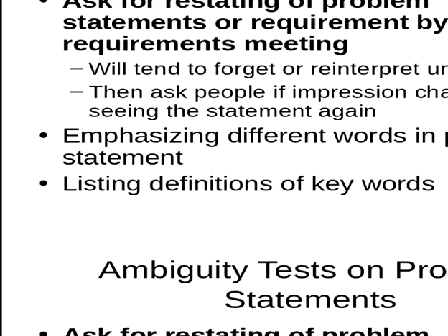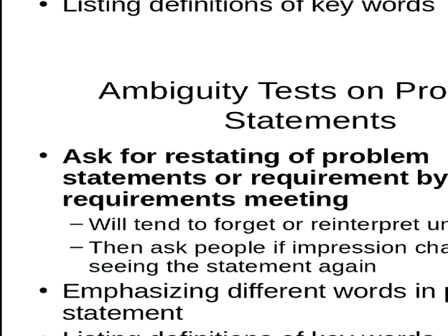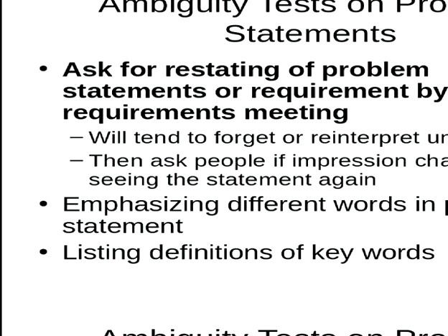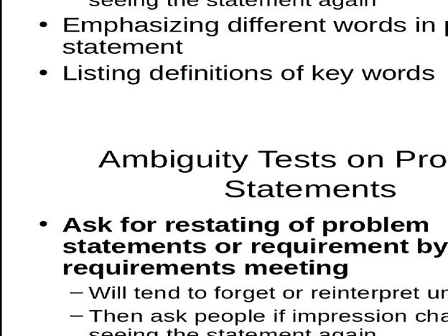So if you are talking with a client, one of the foremost rules I suggest is this one. This is examinable, and I'd like you to remember it. At a requirements meeting, ask them to restate what they're trying to achieve, and the folks who hear it should restate it after hearing it to make sure that they've understood it. Explain it in their own terms, using their own language, and make sure the stakeholder agrees. Yeah, that's what I meant.